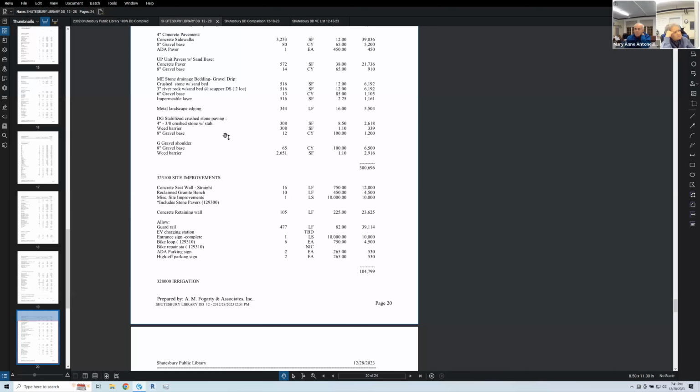We saw a slight reduction in landscaping, and utilities is an increase, where we are still holding on to the duct bank to bring in electrical and telecom from Leverett Road to the transformer pad. We have an add alternate to go to overhead poles. So that would see a reduction in this number. How much of a reduction would the overhead poles be? So we have that as